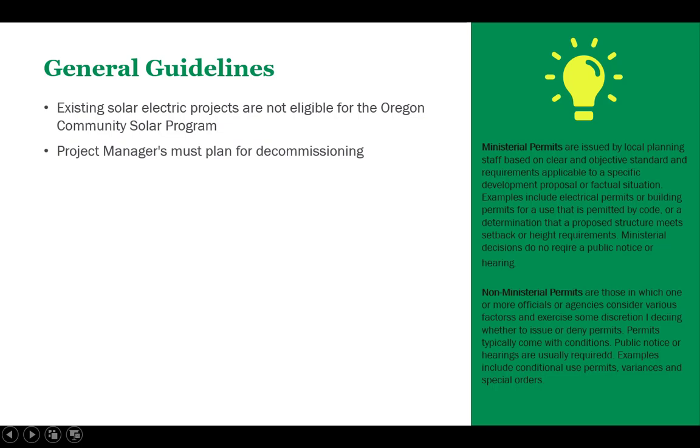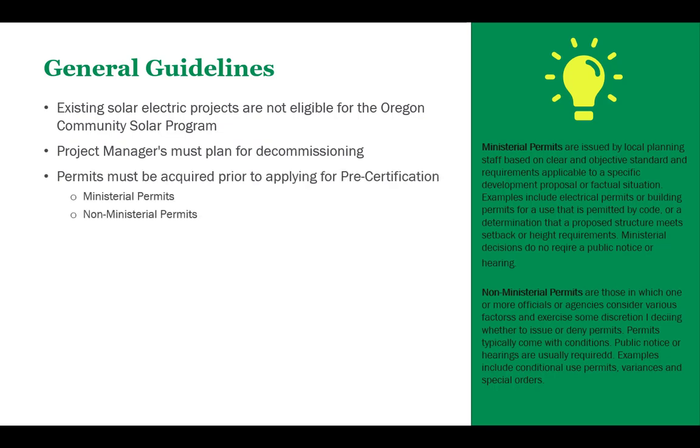The project manager must include the cost of responsibly decommissioning the project at the end of its useful life within the project's financial plan. Any permits necessary for land use must be acquired prior to applying for pre-certification.